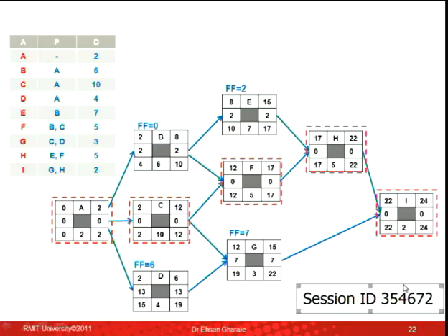Now let's say instead of 6 days, I delayed for 8 days. So instead of day 6, it finishes on day 14. Then G would be delayed. G would start on day 14. It finishes on day 17. There is no impact on I. You see that? So that 13 days of total float, for 6 days, there is no impact on the next one. After that, there is an impact on the next one, but still there is no impact on the very last one. So for 13 days, it can be delayed without an impact on activity I.